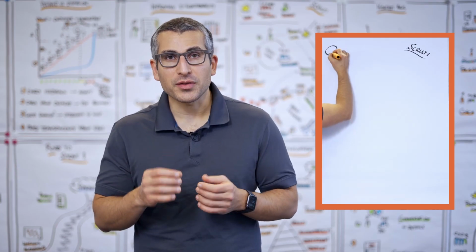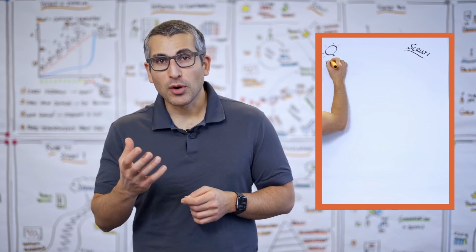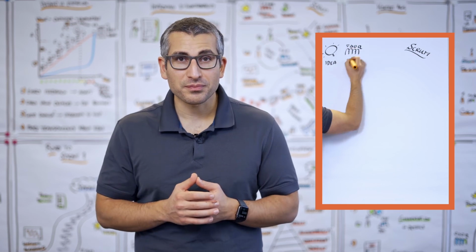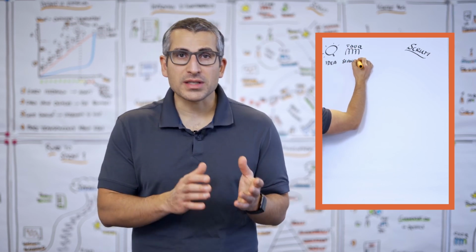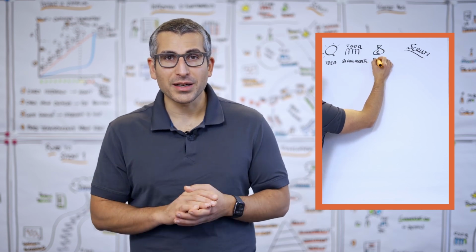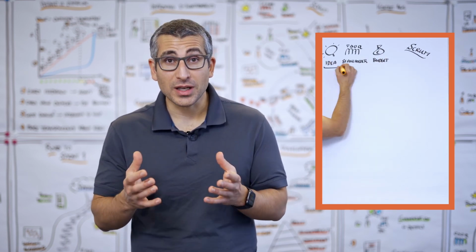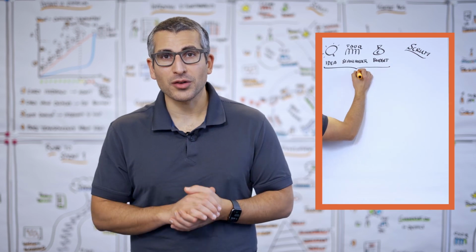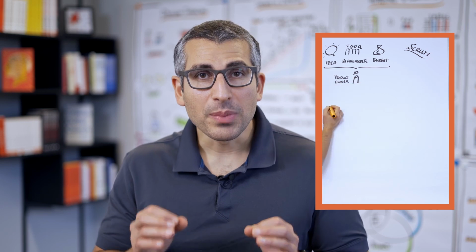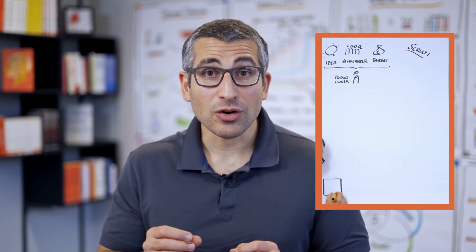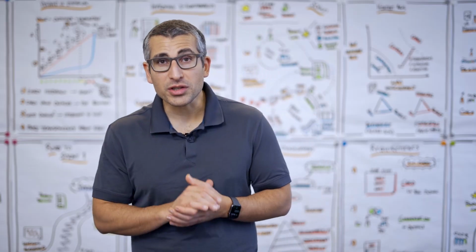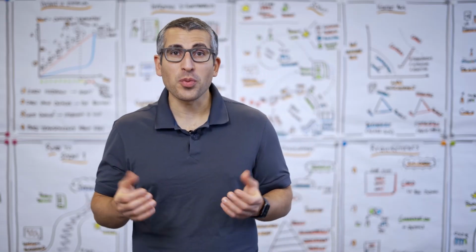Every Scrum initiative starts out with an idea. In most cases, that idea comes from a group that we refer to as stakeholders. That group of stakeholders, or a subset of that group, also provides a budget. Budget and idea are handed over to the Scrum team, or specifically the product owner. Every product owner has one goal and one goal only: build a product that makes as many stakeholders as possible as happy as possible. In order to achieve this, a product owner needs support.